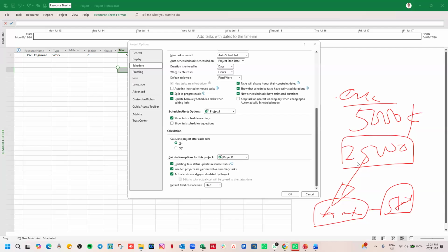So when I use this, sometimes I forget myself and it confuses me a lot, because you start a number of activities and then at the end of the week, you are writing your reports and you see it as though you spent so much more money than you have actually spent. Because all the tasks that you have started, every cost element will be calculated in full as though you have incurred them in full, even though you have not. That is at start.